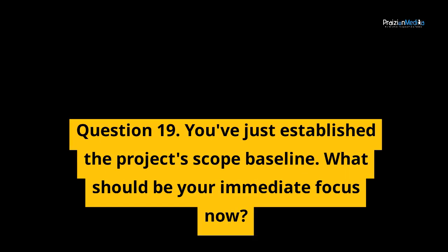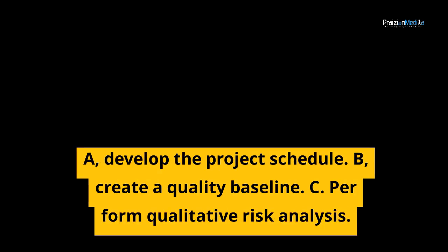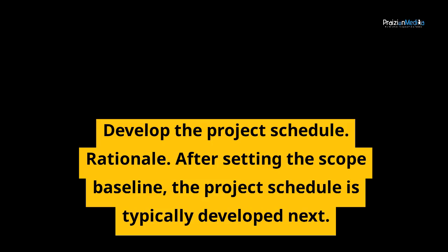Question 19. You've just established the project's scope baseline. What should be your immediate focus now? A. Develop the project schedule. B. Create a quality baseline. C. Perform qualitative risk analysis. Correct answer A. Develop the project schedule. Rationale. After setting the scope baseline, the project schedule is typically developed next.